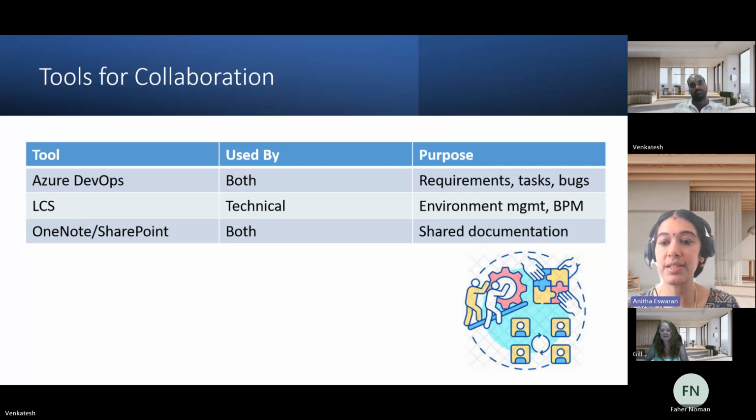If you go and see that work item, it will give you all the details: how complex it is, what the priority is, what effort has already been estimated for it, and whether it is in progress. Make sure you use DevOps properly. It is not only once it is released or once the code is complete or moved to UAT, make sure the status of that work item is also changed so that it is efficient for tracking.